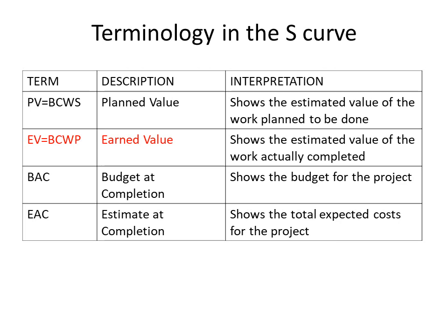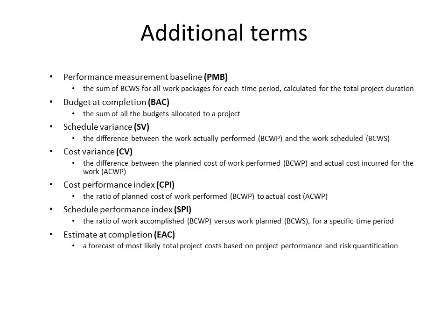So there's some more terminology there: planned value, earned value, budget at completion, estimate at completion. So from these measurements we can also estimate the expected cost at the end, because we know what we've spent so far doing the jobs we have done, so we can use that as a basis for projecting forwards.